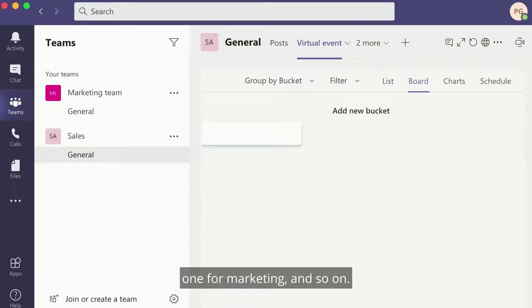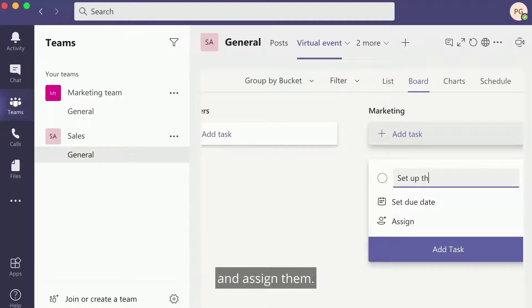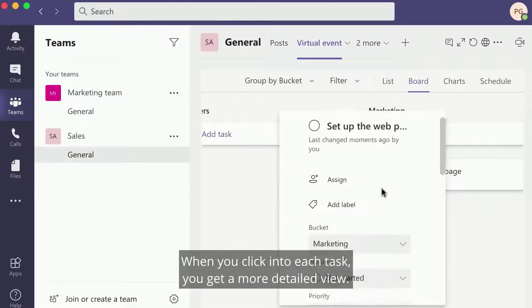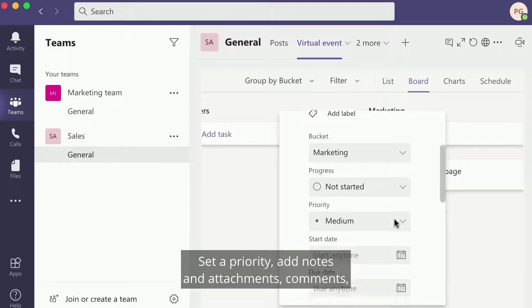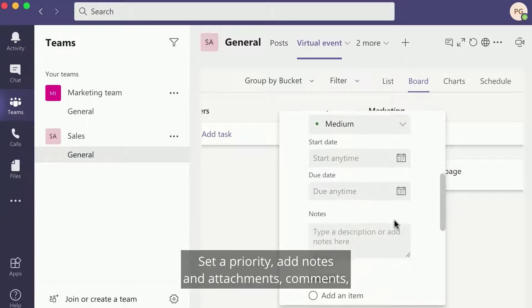Within each bucket, you can set tasks with deadlines and assign them. When you click into each task, you get a more detailed view. Set a priority, add notes and attachments.